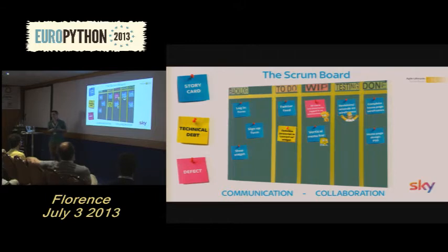At that point, you'll see that we've got these little Simpson characters. These are avatars, and each one represents a different developer. When a developer picks up a card, they'll put their avatar on a card so that the entire team will know who's working on what at any particular time. When a card is done, it will then be moved to the testing column. This is when the QA will ensure that the cards meet the acceptance criteria. When the QA team are happy, then the card moves to done.